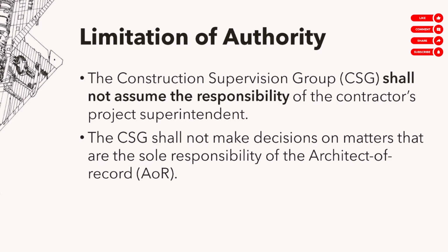We have to keep in mind na yung full-time supervisor, hindi yan tao ng contractor, tao yan ng owner. Okay? Hindi yan superintendent ng contractor, hindi yan dapat inuutusan ng contractor. At mas lalong hindi siya dapat ginagawang foreman or superintendent or PIC ng contractor. Hindi pwede siya yung sinisisi ng contractor kung bakit mali yung pinagawa, o bakit na-delay trabaho.